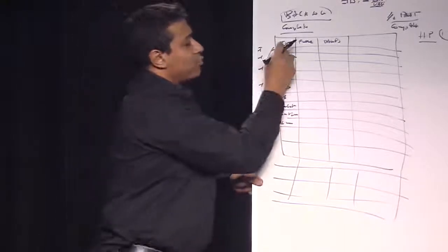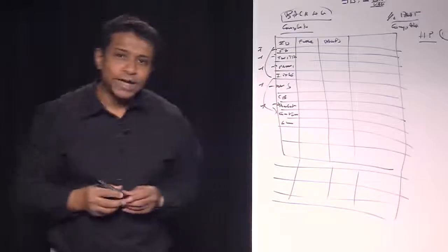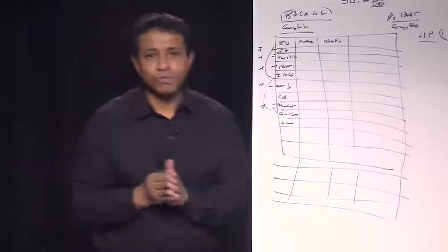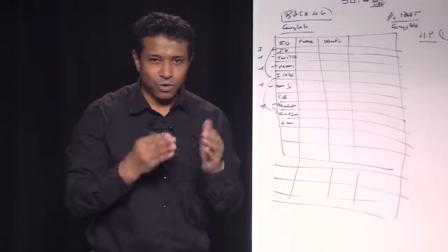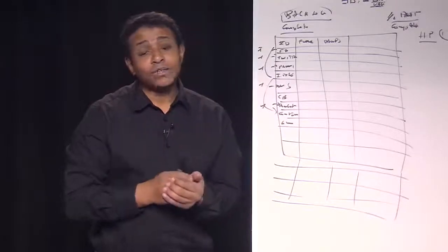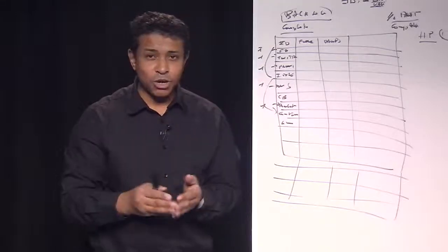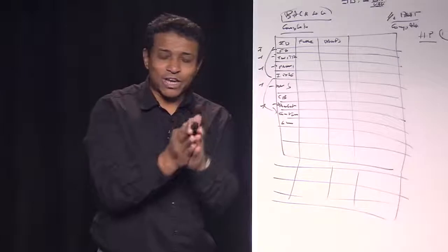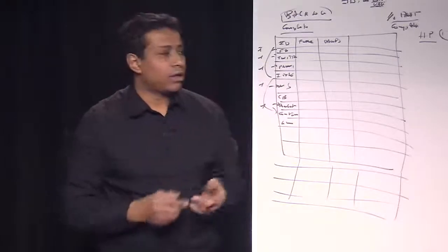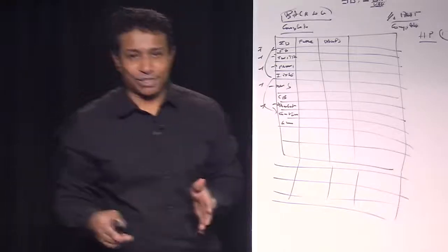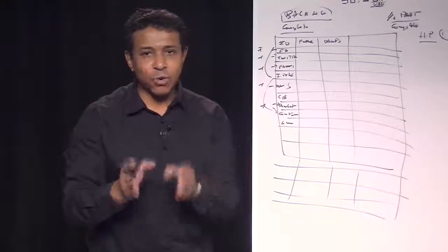And how do I prioritize on the urgent? I can prioritize in 2 ways. What is the easiest to do, so that I can see exactly the things I need in a quicker way, or what is the most important in the business way? The reason why at the beginning of the session we were talking about the business way and the technical way. The product owner makes a choice. You make a choice and say, okay, I want to see it quick first.